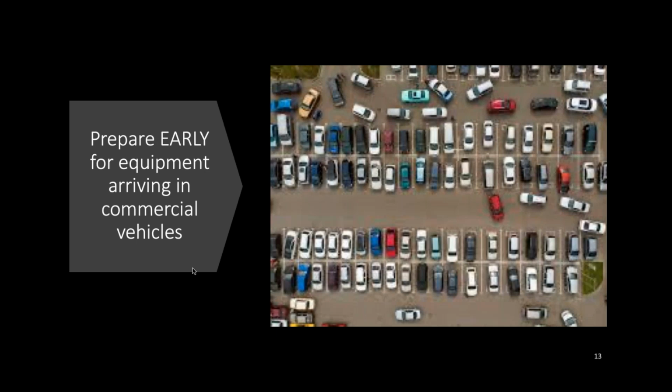Nursing homes and other areas, when they build their parking lots and configure the curbs and the landscaping, a lot of the time it's where big trucks can't get in. In that case, you might have to offload equipment on the street and bring it in a different way. But at any rate, you got to have a plan. Don't get in there and get blocked in and not have a plan and not know what to do. So you got to plan that before equipment arrives.